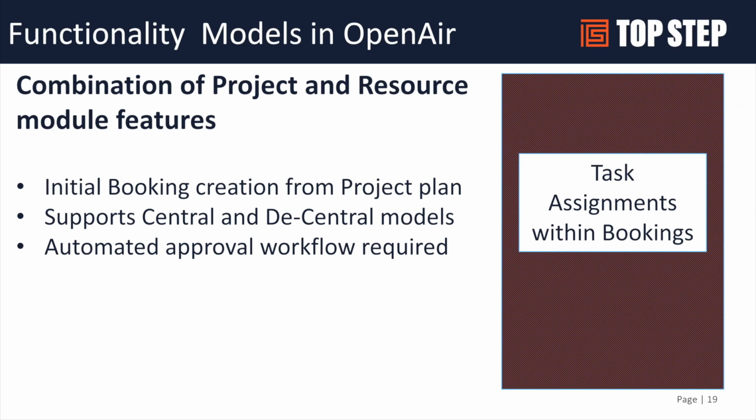A lot of customers will just manually create the bookings, as we mentioned earlier. Once the bookings with named resources are created, they can come back in and update their tasks based on those booked resources. We talked a little bit about that. That can be both a central and a decentral model.